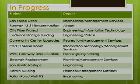The airport project of the runway reconstruction, that started last week. The runway's been removed. They're in the process now of moving the dirt around and removing 6 feet of soil for the lime treatment stage. The city fiber project, which is handled by the engineering and the IT departments, you have accepted bids on that, and I believe the project's start date is imminent. The evidence storage building, which is handled by the engineering and the police department, I believe in-house staff is working on a design for that.